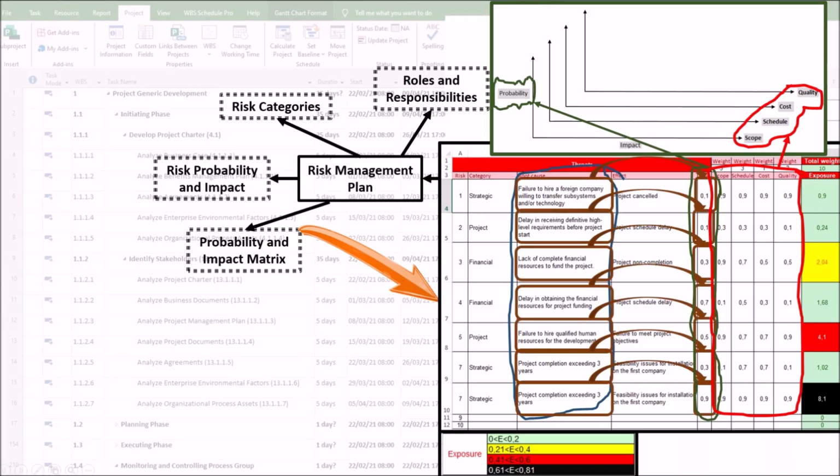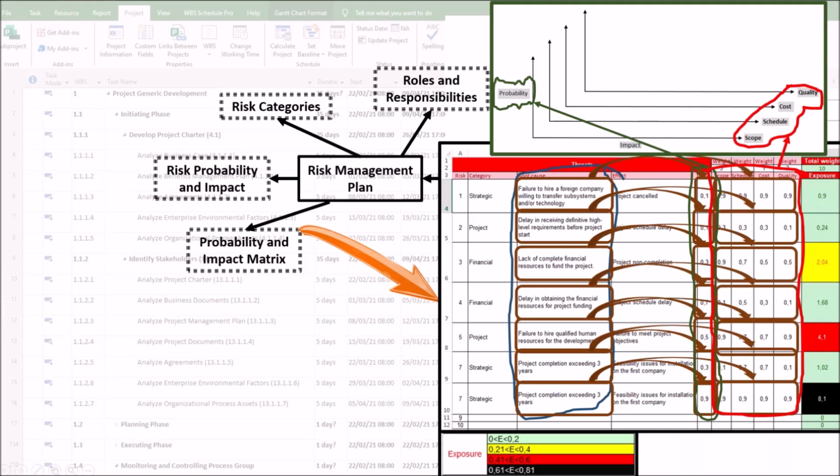For every risk on your list, determine its probability score and its impact score. Plot and prioritize. Locate the intersection of the two scores on the matrix to find the risk's overall rating. Use this rating to decide which risks need immediate attention and what type of response is required.